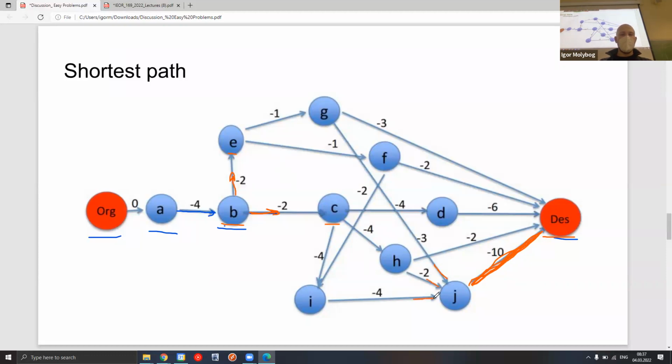Once we have got to J from node I, we will still need to wait in node J before our clones get to J from node H and from node G, just because the tasks G and H still have not been completed. I get it now. Right. And what we are asking here is, the last arc that is going to be completed is going to be the last action that we are doing, right?